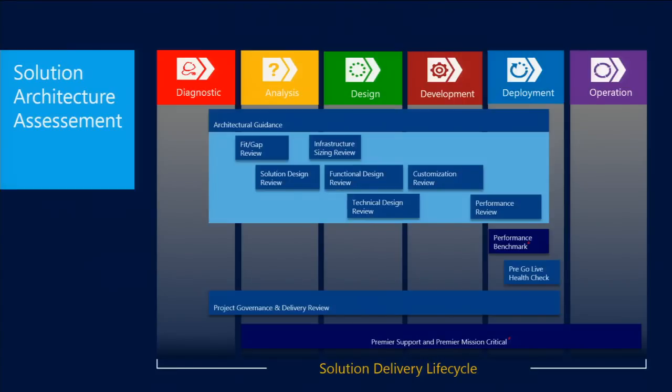In some cases, it's been a bit of a surprise when we go in there and do these checks, and all of a sudden the customer goes, well, we weren't prepared for that. And for us, it was a little bit unfair. We should have actually provided that information up front. And all of you should be thinking about that as well, making sure that you understand what the exit criteria is that you have before go live and start planning for it. It can't be put on all of the team 4 weeks before you go live. It should have already been taken care of already as part of the process, okay?